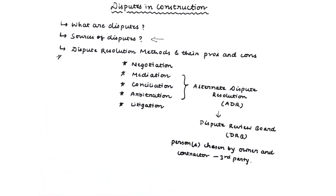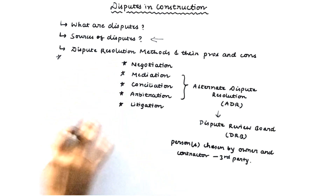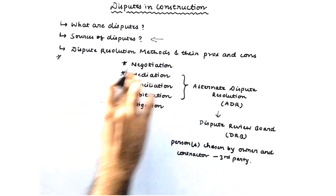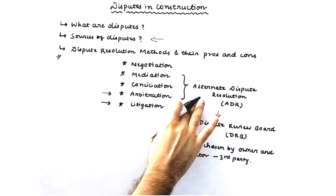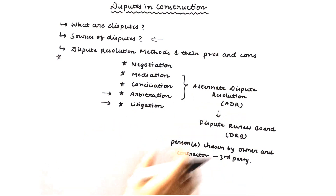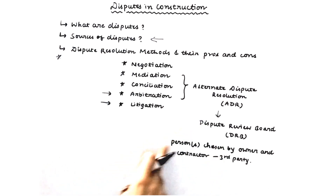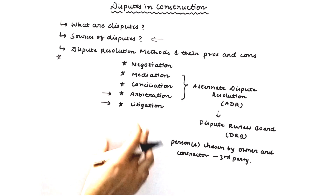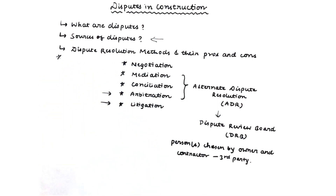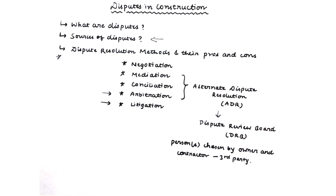This topic is extremely important if you want to become a contracts administrator, whether at site level or head office level. You should know about these methods, especially arbitration and litigation. Mediation, conciliation, and arbitration are called alternate dispute resolution methods — ADR — because they involve a dispute review board (DRB), which might consist of a single person or a panel of three or five people, always an odd number. This board is chosen by the owner and contractor together and is called a third-party board.